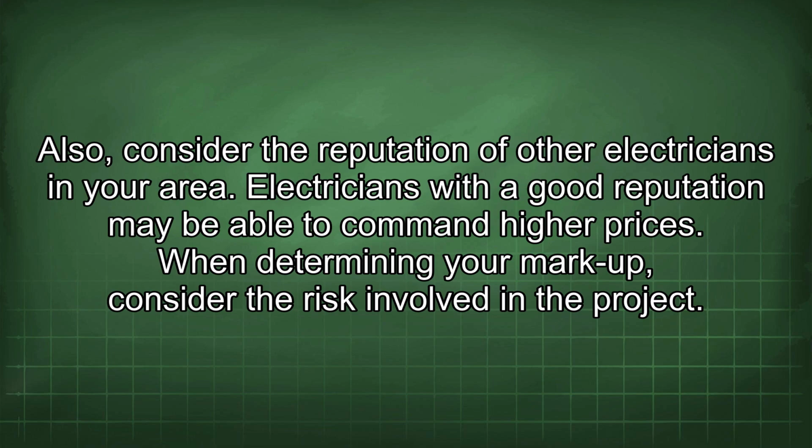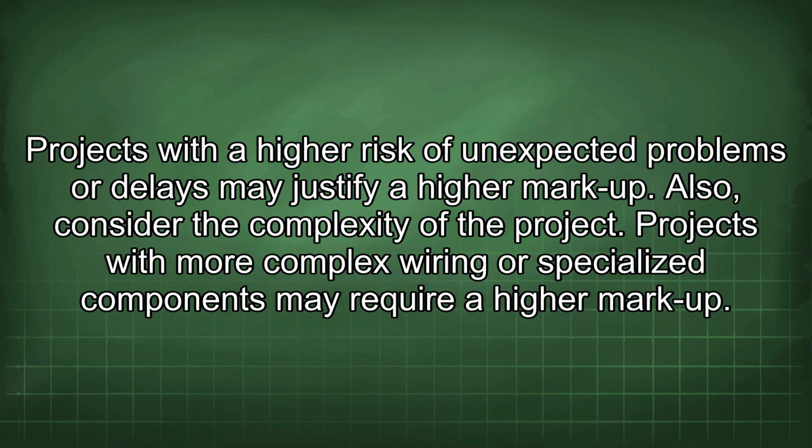When determining your markup, consider the risk involved in the project. Projects with a higher risk of unexpected problems or delays may justify a higher markup. Also, consider the complexity of the project. Projects with more complex wiring or specialized components may require a higher markup.